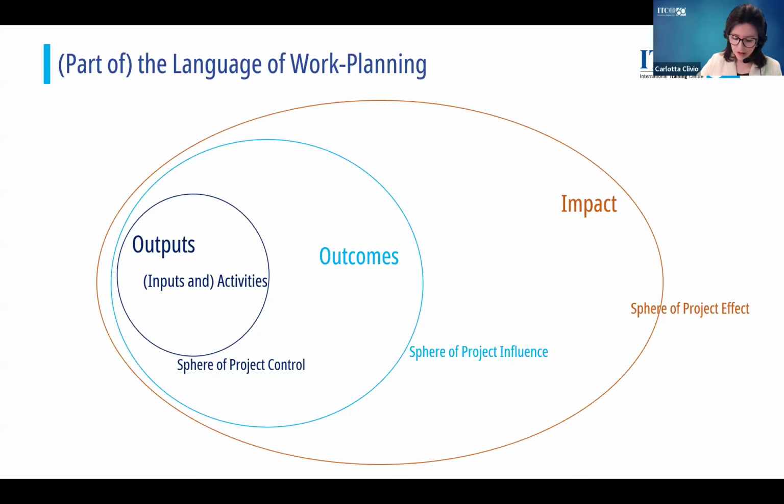I don't know if, Roxani, for the Youth for Climate Call for Solutions, you're asking them to make a calculation of impact over probability when it comes to risk assessment. But if not, even that is very much on the project designer's hands, let's say. So it's a number that you're required to give an estimate for. And I think it doesn't go beyond that. You just need to show awareness, that it's an educated awareness about your risk, and see already how you're going to be accounting for the kind of risk that you foresee. I think that already shows a high level of project development maturity that I'm sure the Y4C Call for Solutions team will feel confident in reading and learning from.